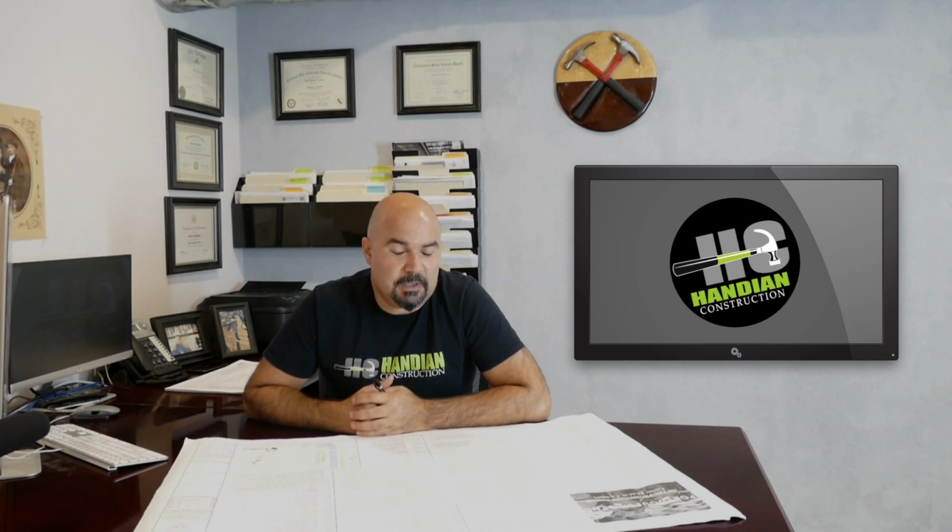So what to expect from us at a site visit? Here are some things we look at. First, we check if you have at least a 200 amp panel. A lot of people think you're going to need 400 amps or maybe less than 200, but 200 is average for a restaurant. If it's less, you've got to get your landlord somehow to upgrade it for you. We check things like the HVAC system. You've got to make sure that's set up by the landlord as well.